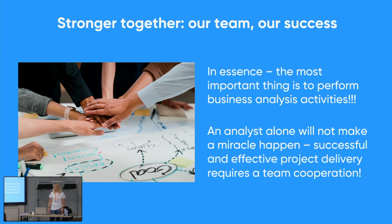But there is a technique that is very useful for me: the RACI matrix, so who is responsible, who you only have to inform, who is accountable. You can do that RACI matrix not only for stakeholders, to see whom you have to contact, but also in the team. For example, what I am responsible for versus the product owner or technical lead. This adds a lot of value too, and of course you have such a page in Confluence, and everybody is on the same page and can double check it.